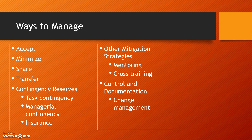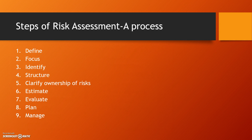We can accept a risk, minimize the risk, share the risk among other parties, transfer the risk, and we'll talk about contingency reserves. We can also mentor and cross-train — for example, if you only have one DBA who can work on this type of project, you can cross-train somebody else at a lesser level or have them mentor someone who could step in if necessary. And of course, we control and document risk through a process called change management, which we'll cover later in the course.